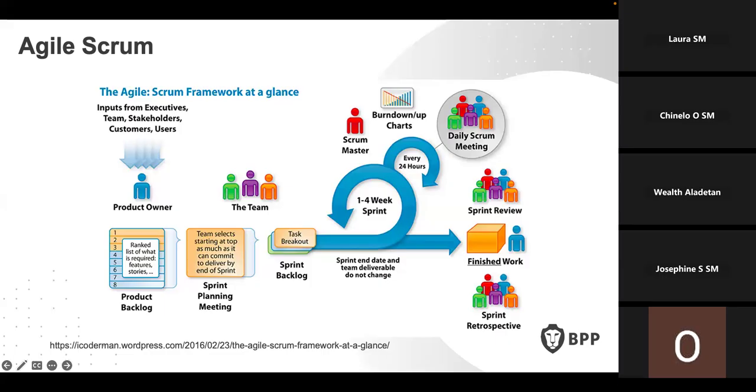there's going to be the main sprint. A sprint can be 2 weeks. There are some companies that have their own sprint of 3 weeks. It depends, but most of them just do two weeks. And within those 2 weeks, they will ensure that all that they have decided they will complete, which are within the sprint backlog, they will wrap up within that 2 weeks.